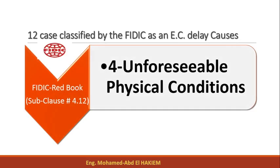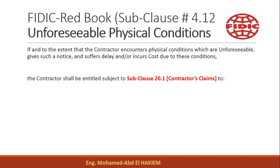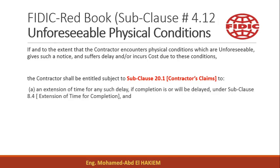Cause 4 – Unforeseeable Physical Conditions. If and to the extent that the contractor encounters physical conditions which are unforeseeable, gives such a notice, and suffers delay and/or incurs cost due to these conditions, the contractor shall be entitled subject to subclause 20.1 (Contractors' Claims).